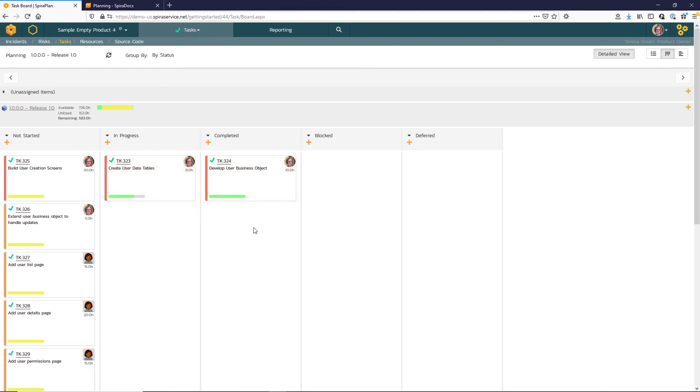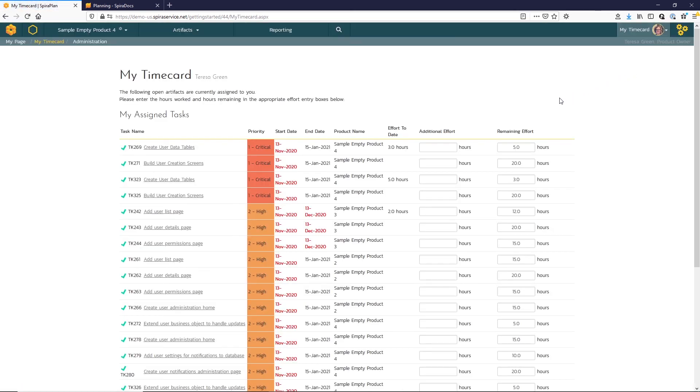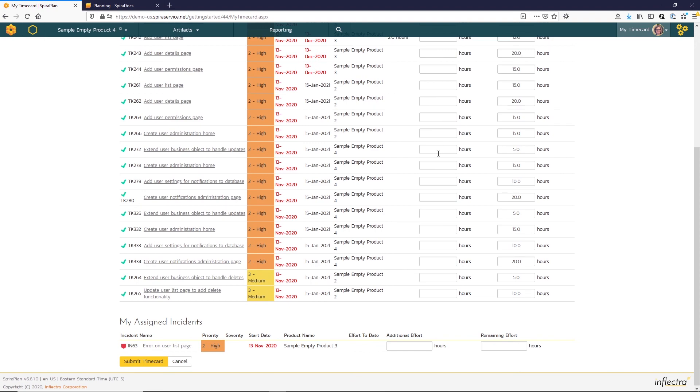There's one additional option for updating time spent on tasks and incidents, and that is to use the time card. You can access that from the dropdown menu for your user profile here. The time card option lets users update effort spent on a number of items all at once.